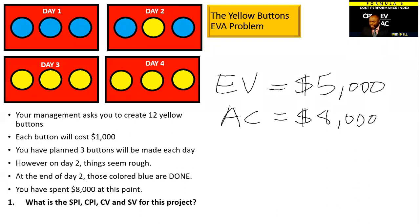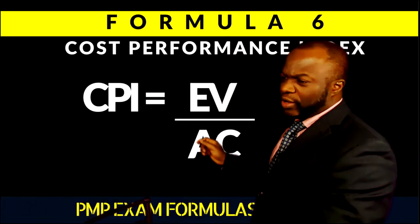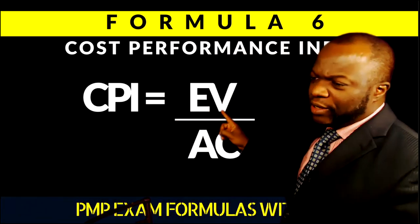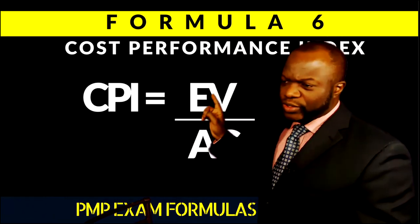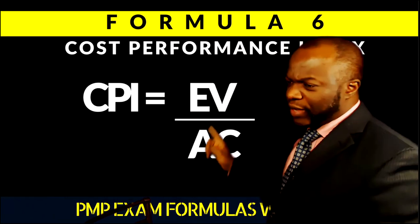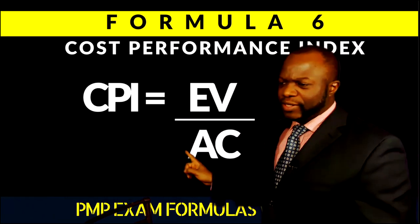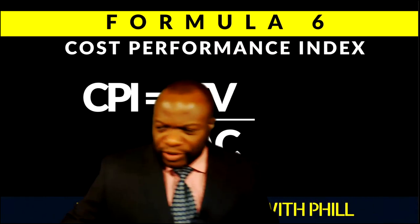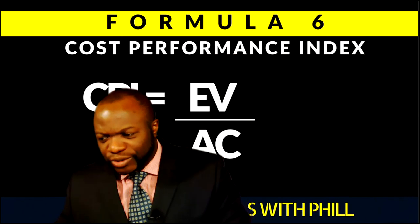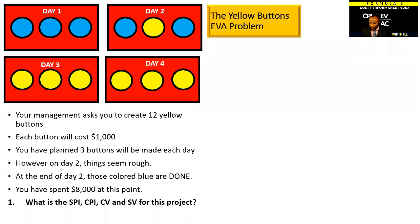As you can see the formula behind me: cost performance index is equal to earned value divided by actual cost. So we're going to do a straight division — earned value divided by actual cost. Earned value is $5,000 and actual cost is $8,000, so we're going to do $5,000 divided by $8,000.